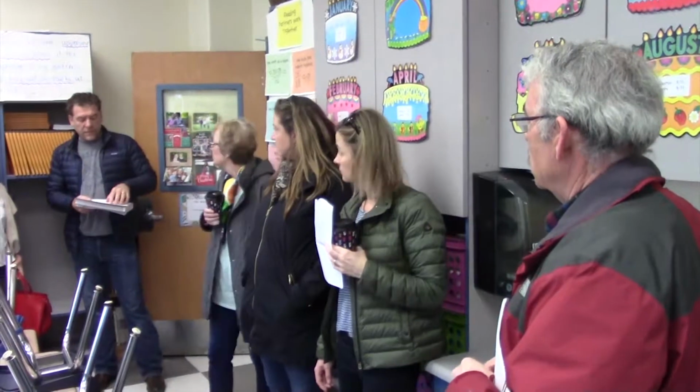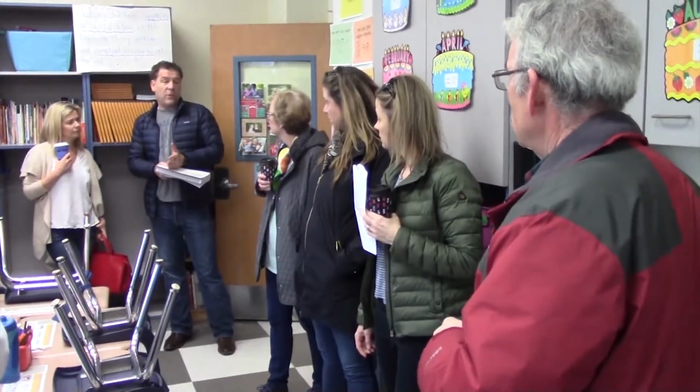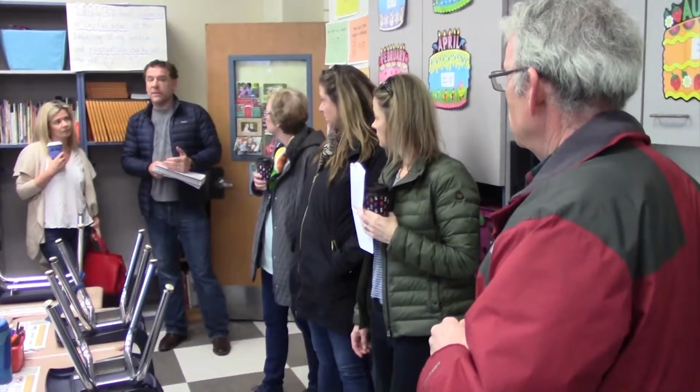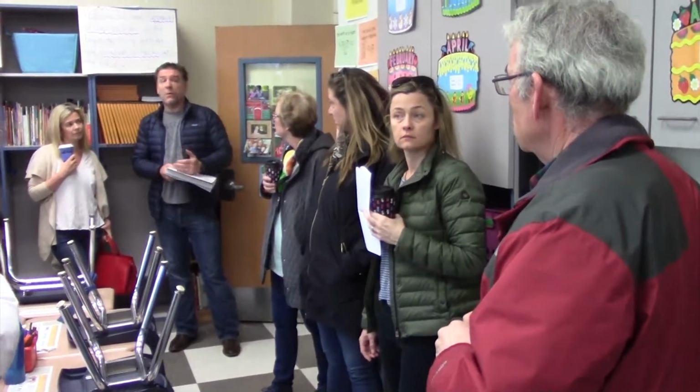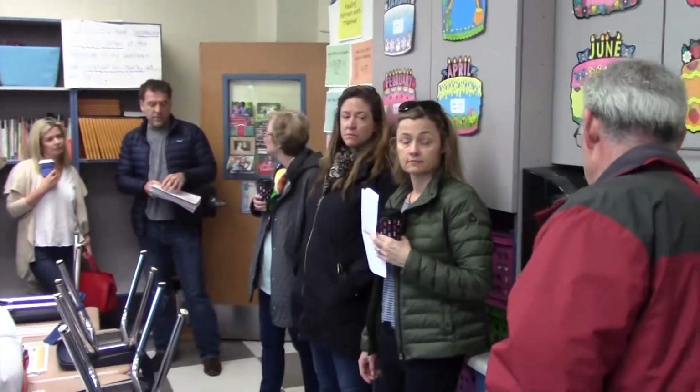So Mike, there's some other ventilation related projects like either level 2, level 3, like out in years 22, 23. You have to look into, does it make sense? Is it cheaper to do them all at once? Kind of advance some of these projects? Are there any economies of scale? There's probably very little economy of scale, but it's more a matter of, is there one mechanical contracting company that's big enough to do all three in a compressed summer time frame while still running all the summer programs that we support or run? And the answer is you can't.